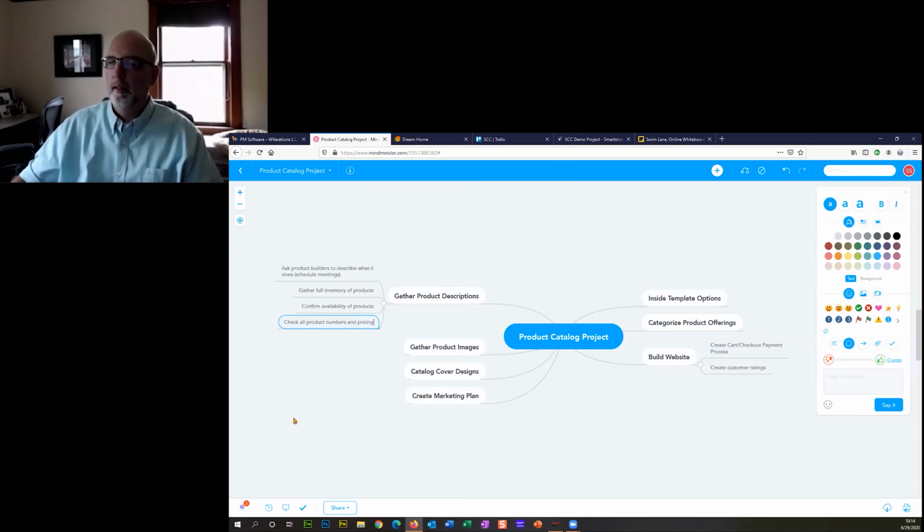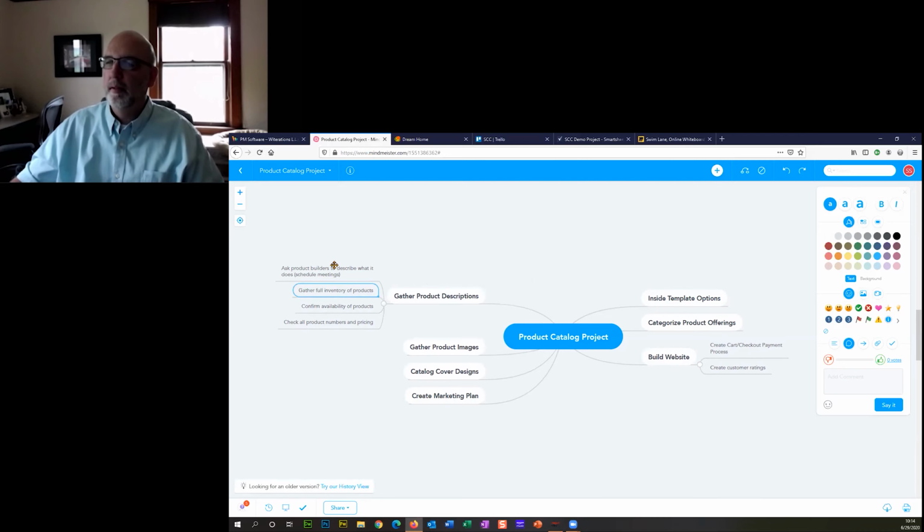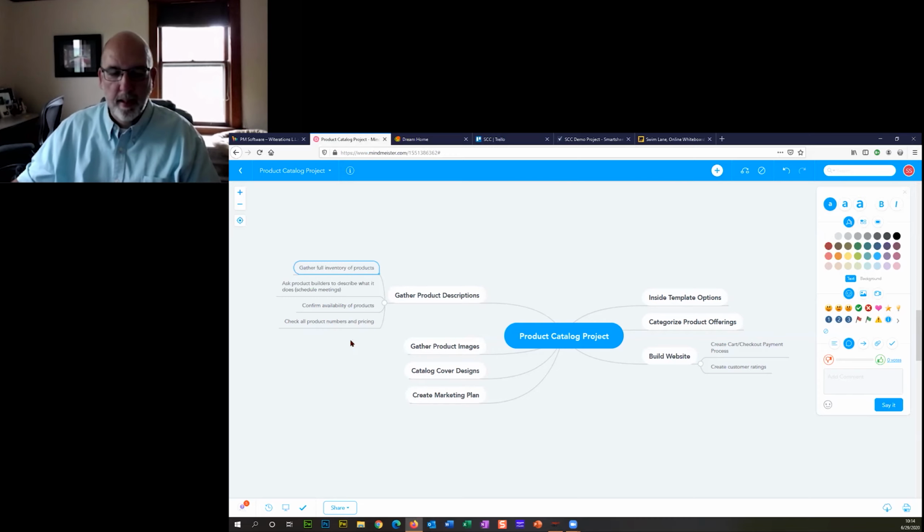Okay, good. So now we're starting to build a product plan or a project plan. We've come up with ask product builders to describe. We're going to gather the full inventory. Maybe we gather the inventory first. Maybe that goes there. Okay, sometimes you goof and the software does things you don't mean for it to do, and that's what happened there. So I'm just going to hit an undo, and we'll just try to, there we go, reorder them a little bit. We're going to gather the inventory, then we're going to ask the builders, then we're going to confirm that everything's going to be ready, and we're going to check all product numbers. Anything else with this task?